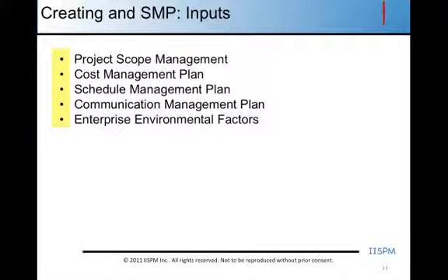We need to understand how the organization is going to require communication, so we need a communications management plan. And we need to look at the enterprise environmental factors. So all of these inputs will create the guts, if you will, of the sustainability management plan and allow proper governance as you move forward through the project.